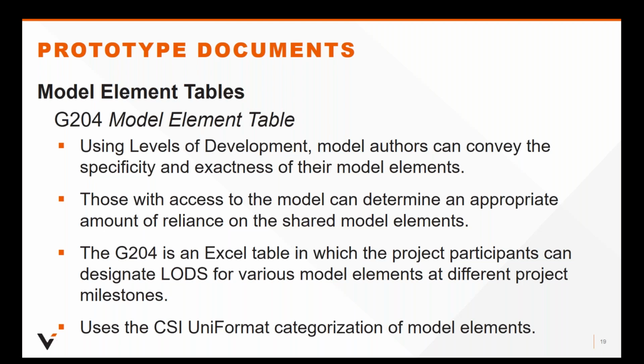Remember that the G204, the model element table, is not an agreement. Rather, it's a project form used to document the LOD decisions once the project participants have agreed on it. Because the protocols are set forth in the form and not as part of the agreement, they can be modified in a different way. You don't basically have a change order to make a modification. So it's easier for project participants to revise the protocols as needed to evolve with the project's needs.